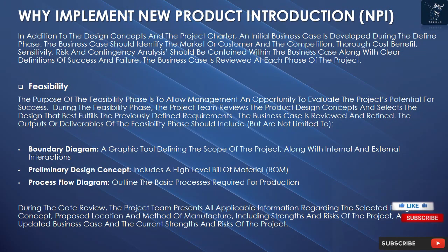In addition to the design concepts and the project charter, an initial business case is developed during the define phase. The business case should identify the market or customer and the competition. Thorough cost-benefit, sensitivity, risk, and contingency analysis should be contained within the business case, along with clear definitions of success and failure. The business case is reviewed at each phase of the project.